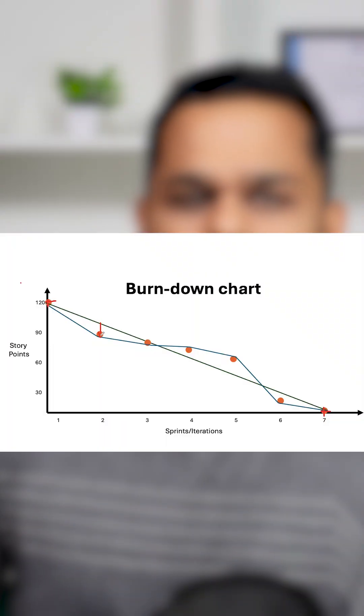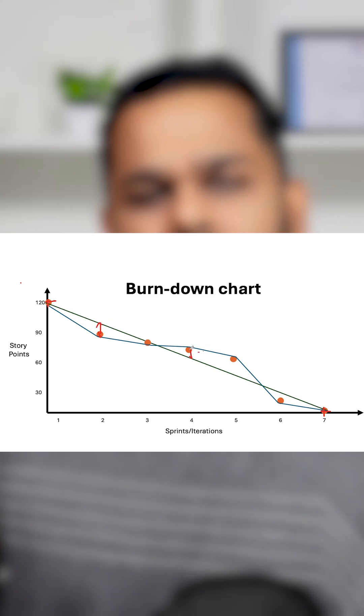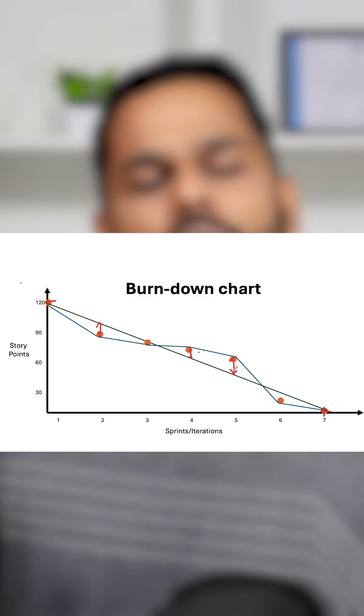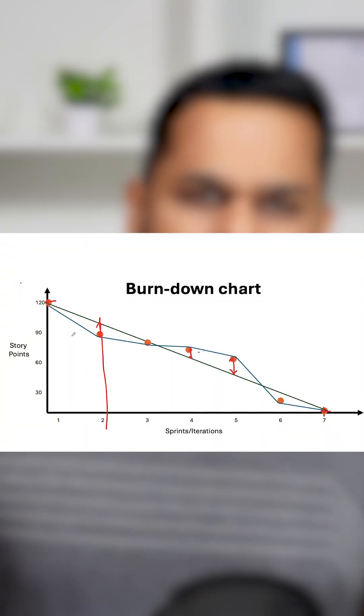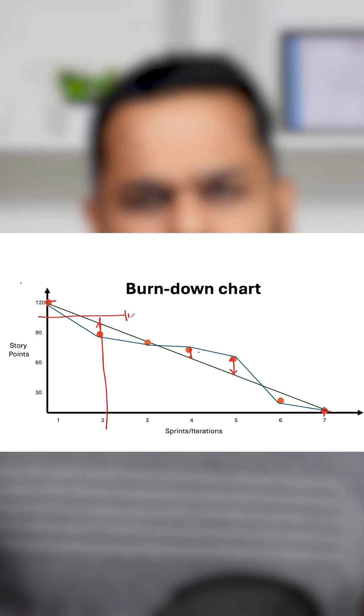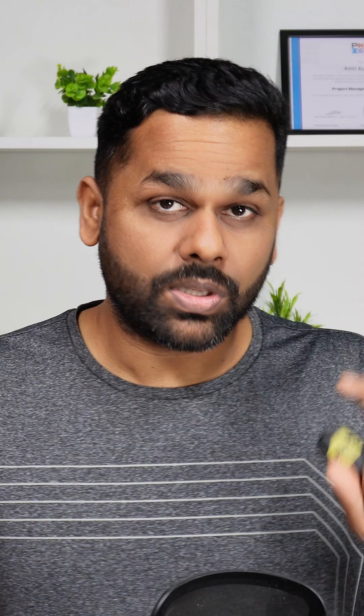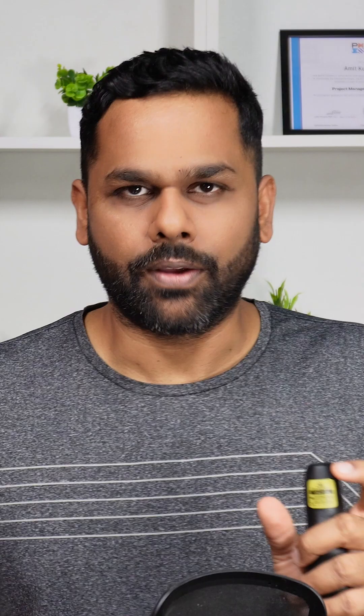When we look at this chart and we see the gap between the plan and the actual, this tells us that there is a variation in what we had planned for and what we are actually achieving. If you look at the second iteration point, there were approximately 100 story points pending — that was our plan. And when the team completed the work, there are 90 story points pending, which means the team is doing a better job. The team is ahead of schedule — they are completing more work than what they had planned for.